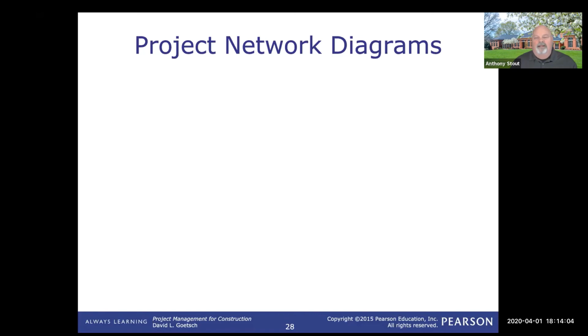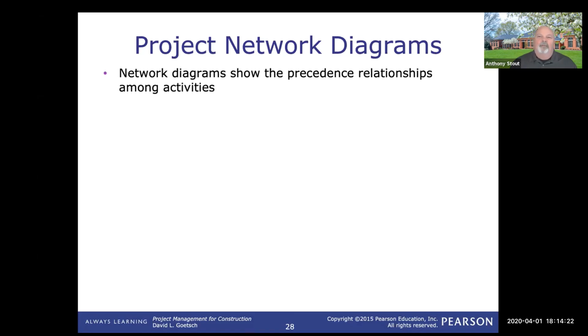So there are dependencies, and we'll look at this. It'll become clear when you start to look at it, and then I give you a demonstration. But it's really based on the dependencies, and you look at the various routes through the network. The one that's the longest is the critical path. And again, we'll talk in detail here in a minute.